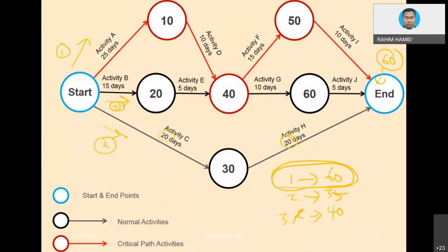You can use this diagram, for instance. And what are the critical activities? Without even calculating the total float to know whether the total float is zero or not, don't crack your head. You already know the longest summation of the path. This would be the critical path, which is colored in red. As simple as that. The rest of the activities do have free time.